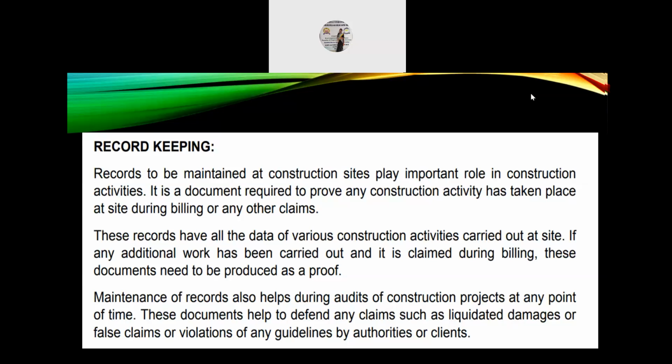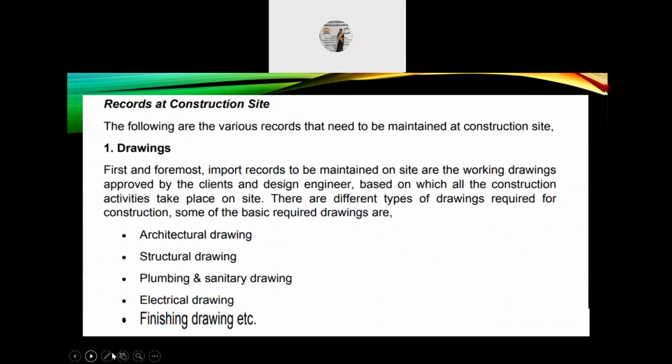Maintenance of records also helps during audits of construction projects at any point of time. This document helps to defend any claims such as liquidated damages or false claims or violations of any guidelines by the authorities or clients. Next, records at a construction site. The following are the various records that need to be maintained at a construction site.